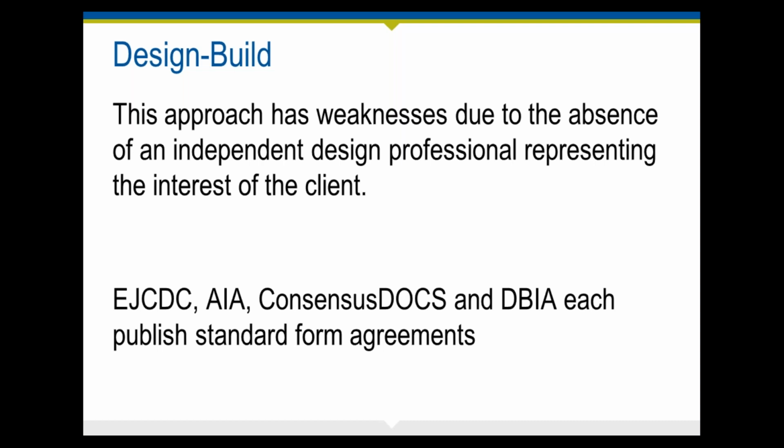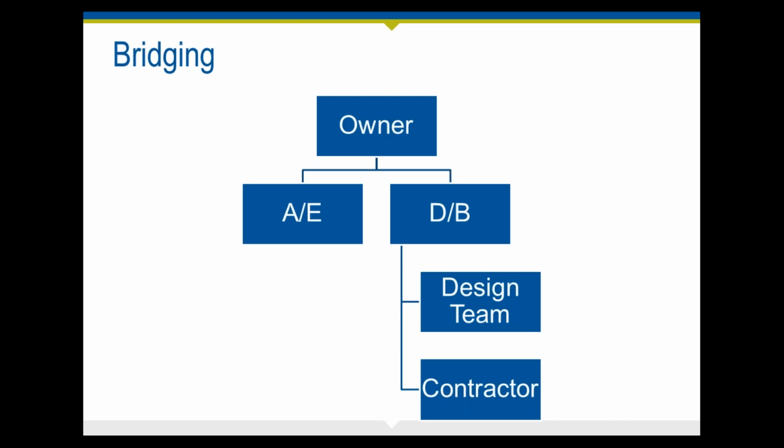One of the concepts that I thought was important that we should discuss is bridging, to address some of the concerns that the owner has about not having an independent design firm. Bridging is intended, if you have an AE serving as a bridging consultant, to achieve the perceived single point advantages of design build while making sure that the client has design professional representation that is independent of the design build entity.